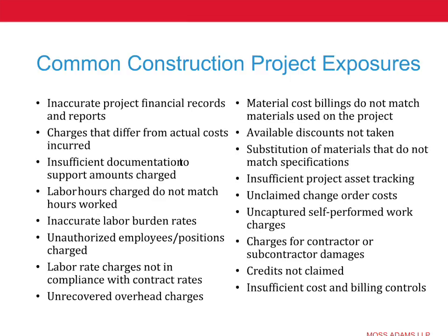Or we'll look for unusual dates for charges, or we'll look for labor rates that don't match the category, that they'll change several times. Or we'll look at the application of burden rates, if you don't have rates negotiated, that don't match the actual burden cost incurred, because that's just a straight up formula and it's easy to look at. So there's a lot of ways to not understand the cost of labor and not have it being charged properly, and we do see those.